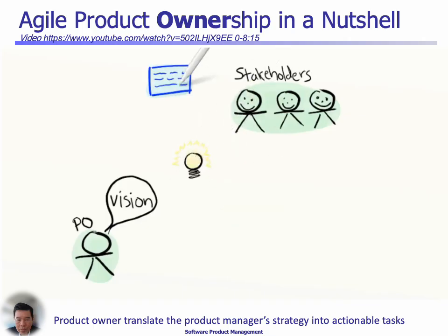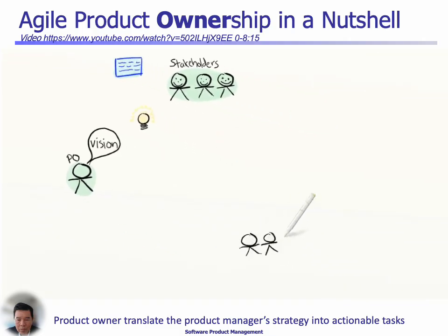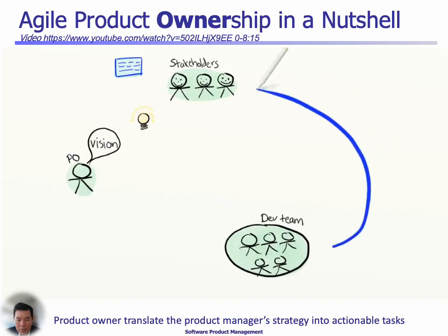Now, somebody has to actually build a system. So here they are, a small, co-located, cross-functional, self-organizing development team. Since this is an agile team, they don't save up for a big bang release at the end. Instead, they release early and often. In this case, they usually release about 4 to 6 stories per week. So that is their capacity. Capacity is easy to measure. Just count the number of stories released per week. Some stories are big, so they count as 2. Some are small and count as a half. But all in all, it adds up to about 4 to 6 stories per week. Some people call these story points, but I'm just going to call them stories per week.